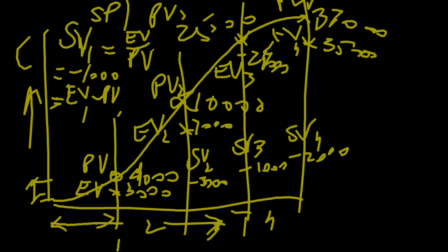So what if I had applied the correction immediately after the first month? The second month's EV should have been like 9,000 or 8,000. So it would have shown a lot of improvement, right? That way I may have crossed the value of PV. EV would have gone more than the PV and my answer would have been 1 or above, ahead of schedule. Got it?